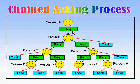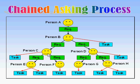Here, chained asking means: when we try to do something which we cannot handle alone, we must divide the job into the portion to handle by ourselves and the portion to ask someone. The same thing will happen with the next person. And finally, the original big request is broken down into these small tasks. I named this work breakdown process chained asking.